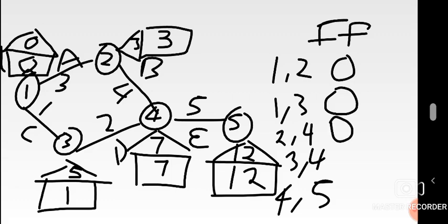There's another one. The activity is 3 to 4. 3 to 4, there's 7. 7 minus 1, we have 6. 6 minus 2, there's an activity there on the arc as 2, the line connecting the 2. So it was 6 minus 2, 4.